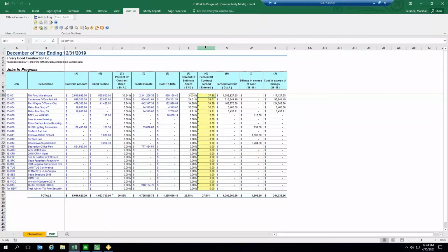Anything you'd like to add on the work in process report before we jump into the designer module today, James? Only, again, to reinforce that this particular one may be calculating percent complete based on the cost and estimate, but many people will calculate it based on what they know the status of the project. So it would reflect that forecasted amount. Another point is that this is not based on a cutoff date, but there is one on the Launchpad, or it is now currently available on the Launchpad, that it has a cutoff date, so it's generated based on that.